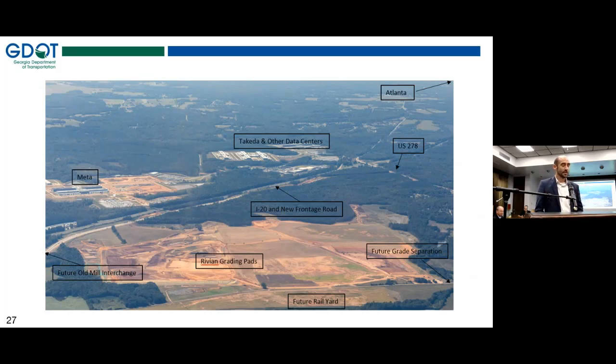Regarding the funding itself, these projects, along with what I'll talk about on the Hyundai project, were not in our program. These were brand new additions, so that as we worked through this effort, in recruiting Rivian, recruiting Hyundai, the department committed to delivering these projects. We did not realize additional funding to do so. All right, so as we introduced these into the program and placed funding on them, it did come at the cost of shifting other projects to accommodate these being accelerated to meet this demand.